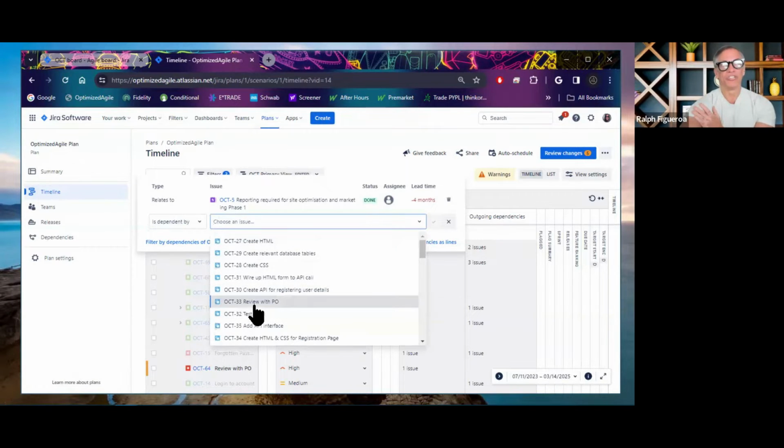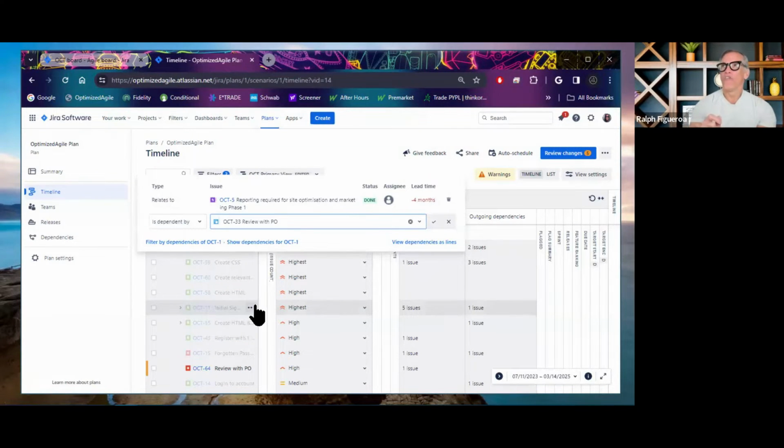So there's really no restriction for you as a program manager, engineer, or product manager to call out dependencies between issue types and across projects, as long as those projects are part of your issue source. Therefore, you don't have to have multiple sources to track information that lives in different projects. You can use JAR by aggregating all that data and calling the dependencies in Jira Advanced Roadmap.